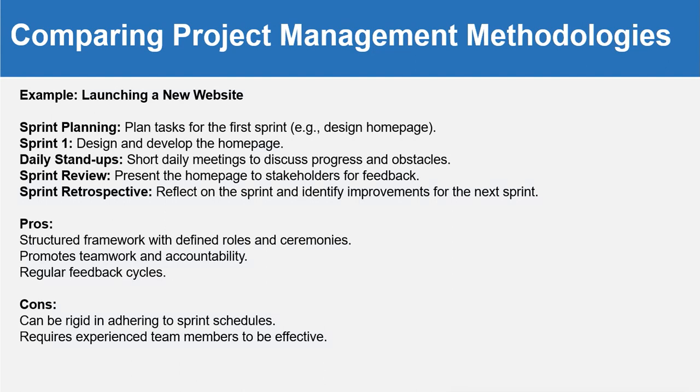The example is launching a new website. Sprint planning means planning tasks for the first sprint, that is design homepage. Sprint 1, design and develop the homepage. Daily stand-up means short daily meetings to discuss progress and obstacles. Sprint review means presenting the homepage to stakeholders for feedback. And sprint retrospective means reflecting on the sprint and identifying any improvements for the next sprint, like what went well, what went wrong, etc.